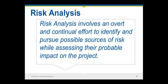As you assess each of these factors on a potential new project, think of them on a scale of 1 to 10, with 1 being very low risk and 10 being very high risk. Or you can do a scale of low, medium, and high risk. You probably want to identify each risk separately, then at the end tally up all the items and determine the overall risk for the project. We also have on our website an interactive risk management matrix that will walk you through this and give you even more details than I'll be able to go into today.